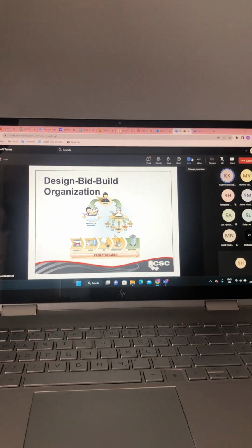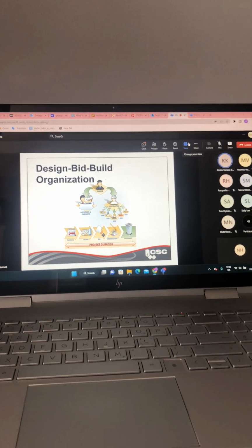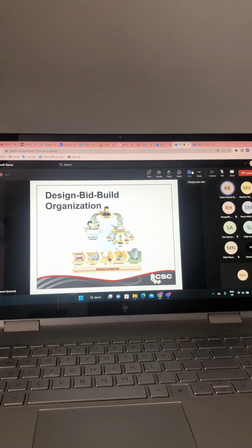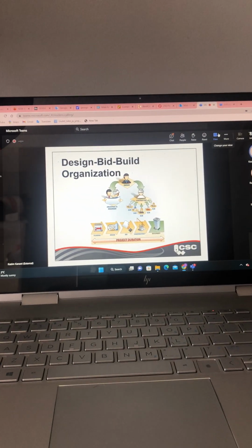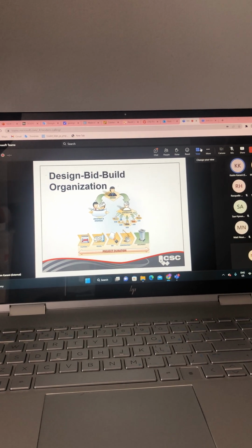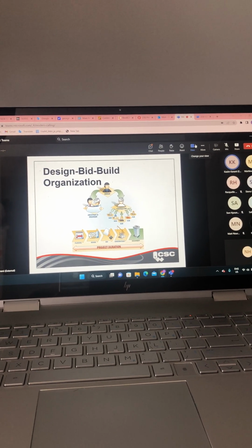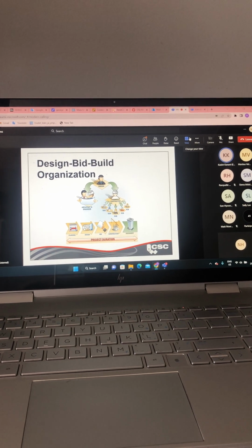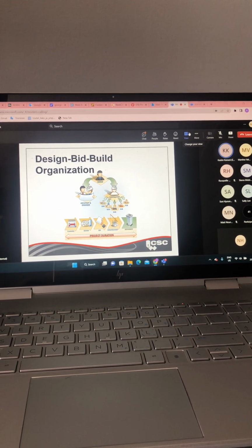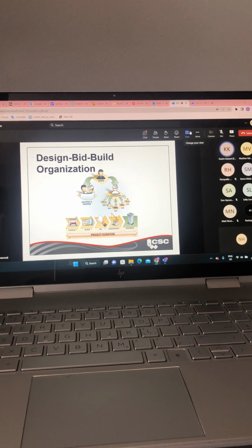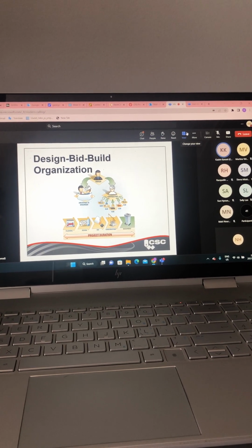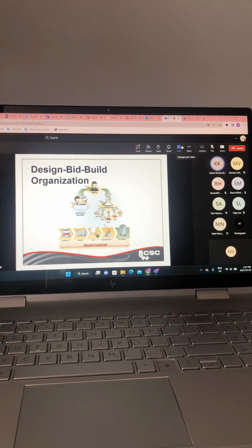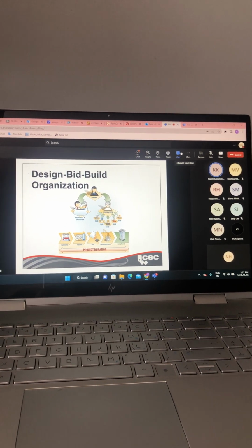You will notice from this arrangement and agreement, or this format, that the owner does not have any contractual relationship directly with the subcontractors. That is only done through the contractors. And as you're all well aware, the architect or the consultant in this particular instance has a third-party relationship with the owner and the contractor because the consultant's responsibilities are spelled out or stipulated within the owner-contractor agreement.